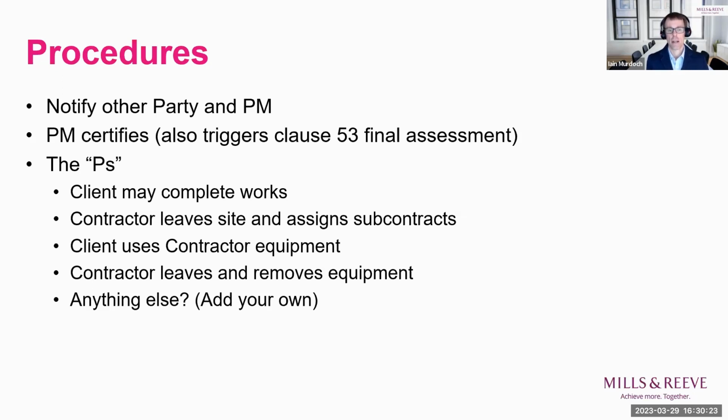The procedures are that the client may complete the works, the contractor leaves site, but is required to assign the benefit of its subcontracts. The client may use contractor equipment to complete the works, or the contractor leaves the site and removes its equipment. And again, I am very happy being supportive of the NEC philosophy that there's a balance in this contract and that things have been set out in a particular way for a particular reason. But there may be good reasons for any particular project why you might need your own procedure to apply. And adding a P that sets out what might need to happen on termination is a very valid Z clause choice,